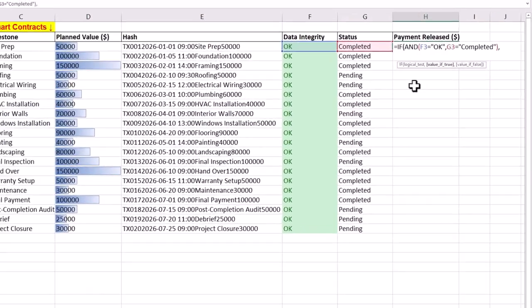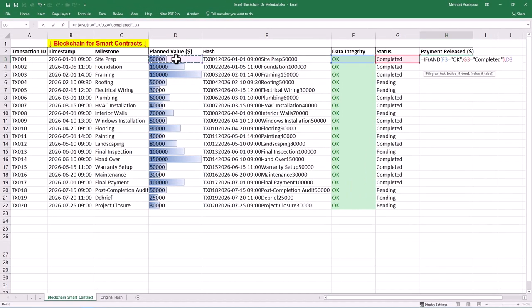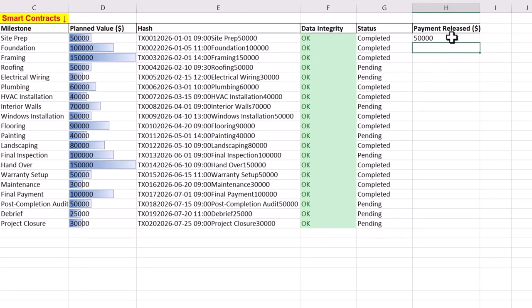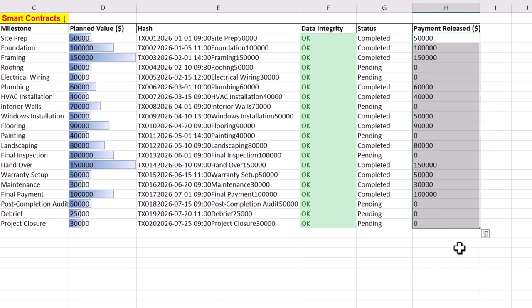If both conditions are satisfied, the payment will be equal to the planned value in column D. Otherwise, a zero value is returned. The formula is then replicated for the following project activities: foundation, framing, roofing, and others.